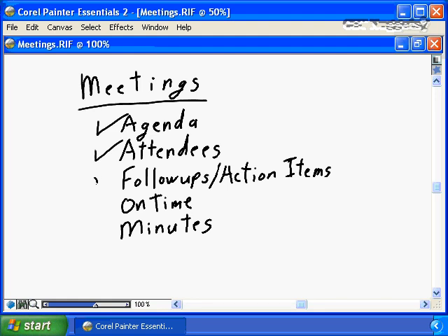As you're going through your meeting, if items come up that cannot be resolved in the meeting, if items come up that need additional information, if items come up that two people in the meeting should review and discuss and present a recommendation, generate follow-ups, generate action items. Do not drag a meeting down while two participants in the meeting have a 10-minute discussion on how to resolve something. Give them an action item. Say, go away, resolve this, and then report back to the meeting attendees what the resolution is going to be, or worst case, let's schedule another meeting to review your recommendation and alert all the remaining attendees of what that recommendation is going to be.